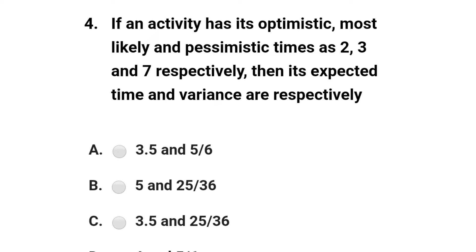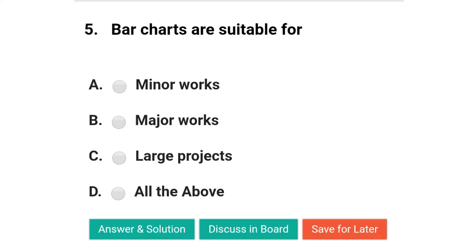Next question: if an activity has its optimistic, most likely and pessimistic time as 2, 3 and 7 respectively, then the expected time and variance are respectively — option A: 3.5 and 5/6; option B: 5 and 25/36; option C: 3.5 and 25/36; option D: 4 and 5/6. The correct answer is option C: 3.5 and 25/36.